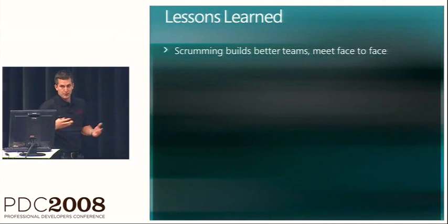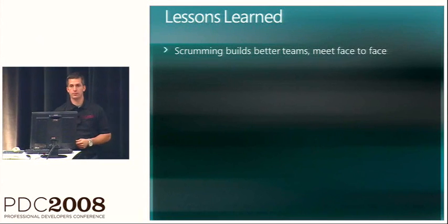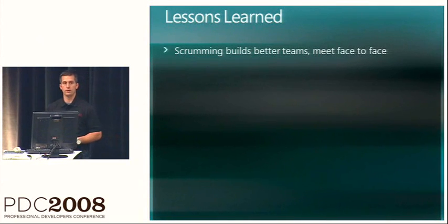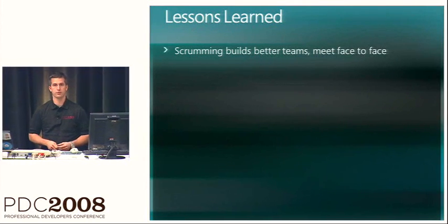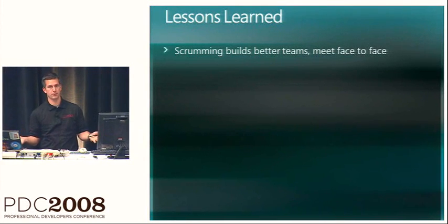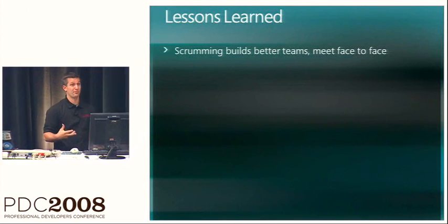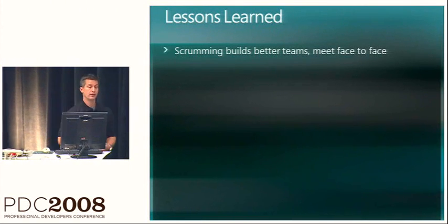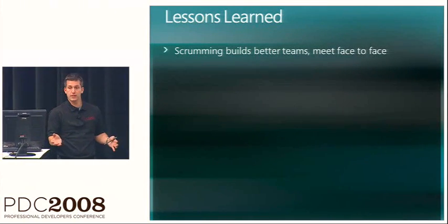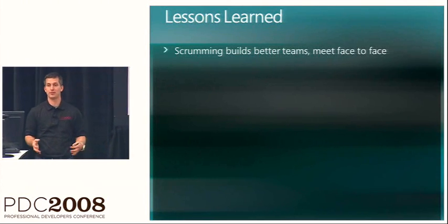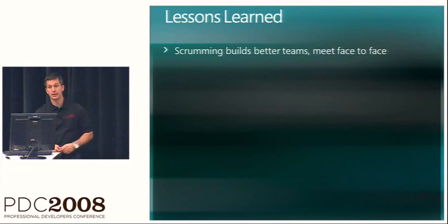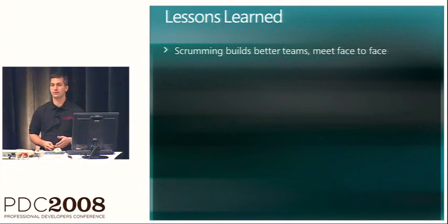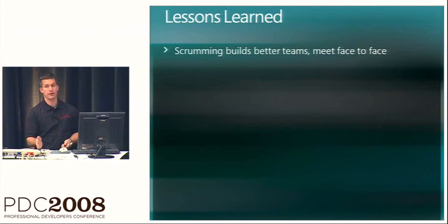And most people are experiencing this today. You know, scrumming builds better teams. We definitely found that scrumming helped us tremendously on this project for a couple reasons. One, we are geographically dispersed. Two, we were working with about 6 different vendors. And, God bless, everyone has their own individual business to run. But at the end of the day, whenever you're working on a big project, everyone has to be on the same timeline. Scrumming really helped snap everyone to that same timeline. Like, look, every Friday we're having a build done.